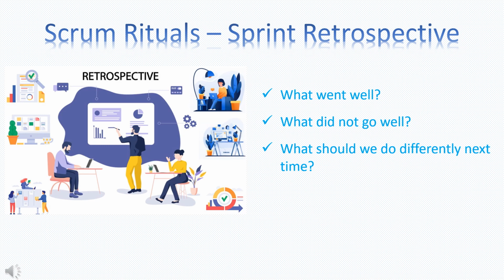The sprint retrospective focuses on three main questions: what went well, what did not go well, and what's going to be done differently. Sometimes there's a fourth question, which is what are we going to just wait and deal with later. Put it in a box, it's a time frame box. The sprint retrospective focuses on work of the project and never devolves into blaming individual team members. If a Scrum team is not performing a sprint retrospective meeting, it is not doing Scrum. This is a critical event in Scrum, and continuous improvement will not be achieved without it.